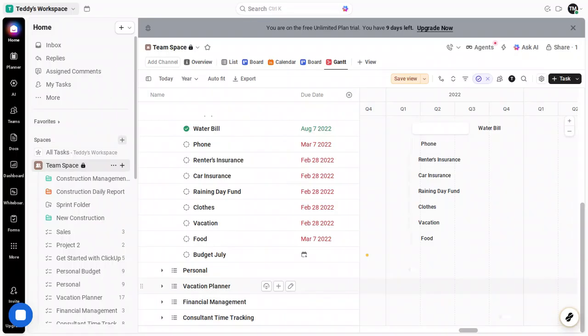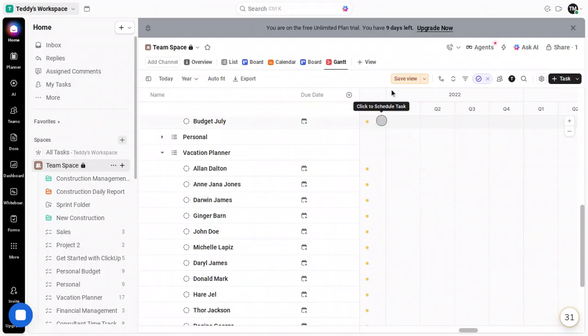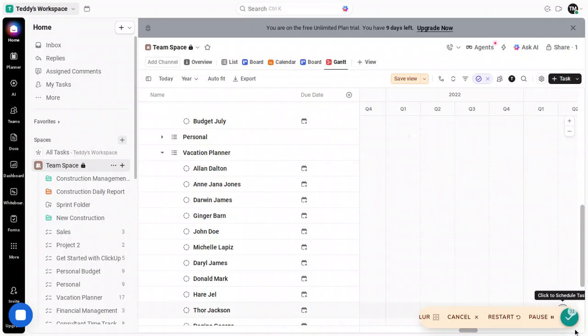Completed tasks stand apart from those in progress or not started. If you're planning daily work and want urgent or high priority items to jump out, color by priority is a smart pick, especially if you took time earlier to set priorities like urgent, high, or normal. If you're organizing a multi-project space and want different streams to be obviously separate, color by list provides that clarity instantly. And if you just prefer a clean, uniform look while you set up details, default keeps everything consistent until you're ready to switch. Highlights add another